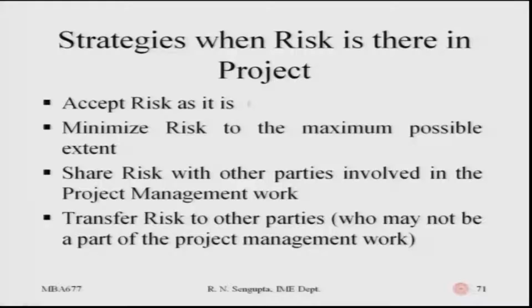Transfer risk to other parties who may not be a part of the project. So, it can be, for example, in finance, that we buy different types of derivatives, different types of forwards and futures, such that the overall risk of the project is reduced. Consider this example: you have oil exploration coming up and you know that within 3 months you would be in a position to tap the oil and sell it as crude in the market.